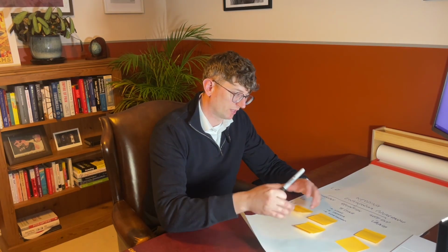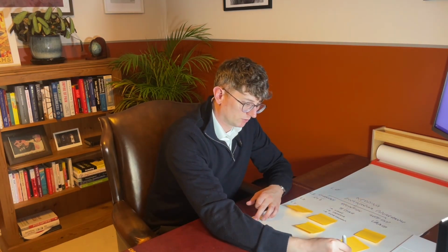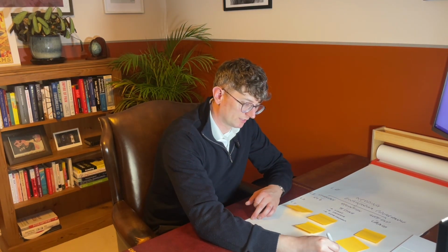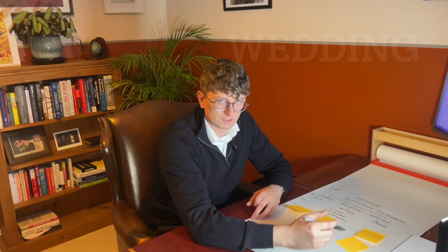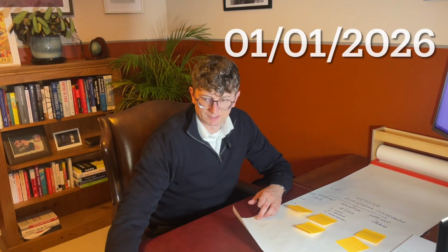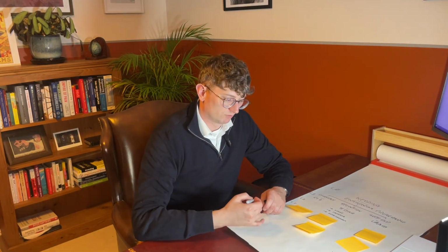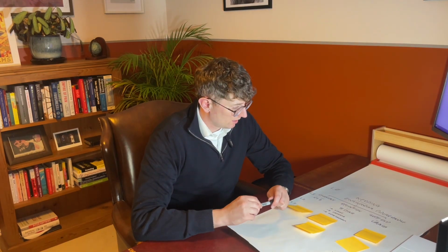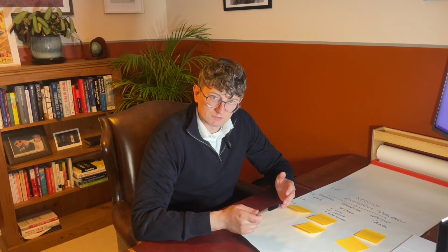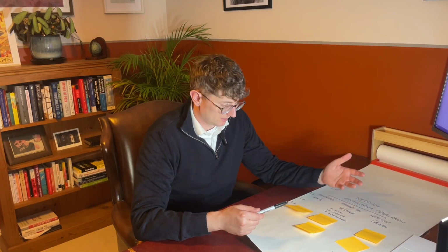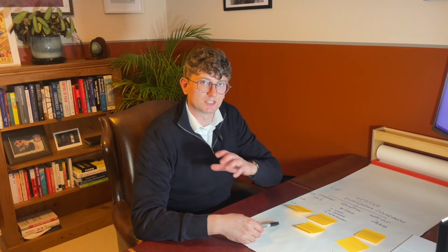So once you've got a draft that you're happy with, in the bottom corner, let's call it version 1. So annotate it, give it a title. So it could be wedding, it could be engineering program, and you'll have something more specific. And then the date as well. And this allows us to then version control it. And if it changes, we'll know when and how it looked at a certain point in time. If something gets forgotten, we'll see that it was missed, or it was then not enacted properly through the later stages of the project. This allows us to control it.